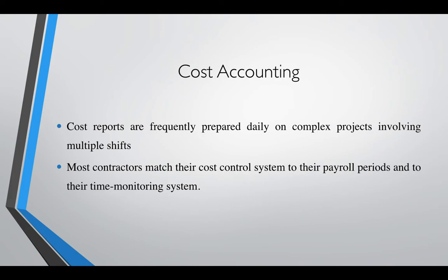Continuing with the PowerPoint, cost accounting. Cost reports are frequently prepared daily on complex projects involving multiple shifts, and most contractors match their cost control system to their payroll periods and to their time monitoring system.